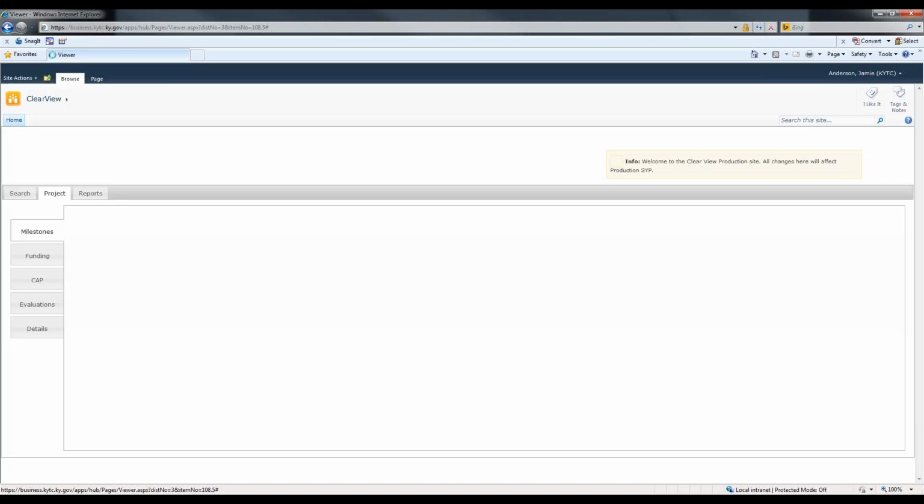Key times for revisiting these dates should be when consultant monthly reports are submitted with invoices and prior to status review meetings. So, for example, if a consultant has recently submitted a monthly report and final roadway plans delivery has been delayed, this is when you'll need to go into Clearview and update the scheduled completion date for the roadway plans.